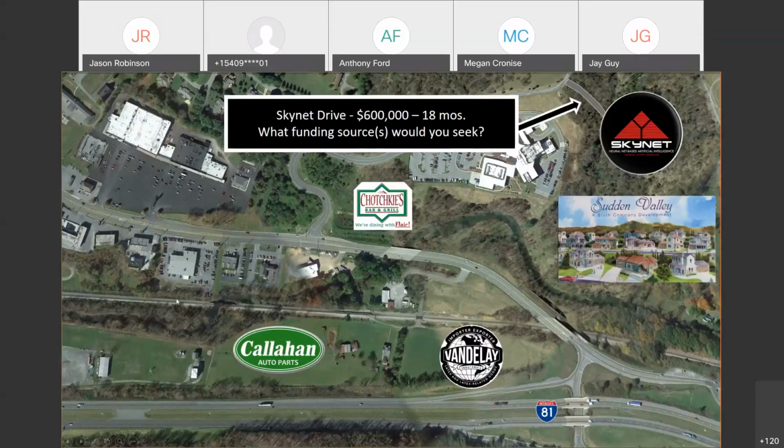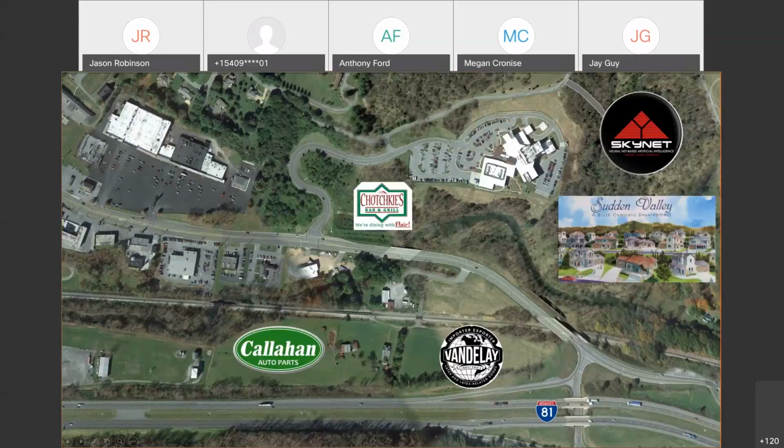This disclosure is one other point. We get into a little bit of eligibility issues with revenue sharing on cul-de-sacs. Usually revenue sharing requires connecting to roadways. So the eligibility for revenue sharing on that may or may not work. I'm not 100% on that. Another great point.